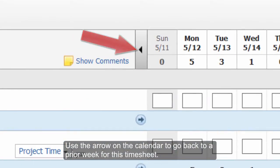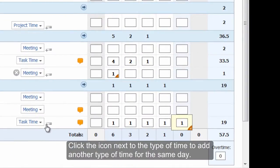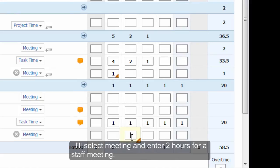Use the arrow on the calendar to go back to a prior week for this timesheet. For admin work, I'm going to enter task hours in the date boxes for time spent emailing and doing paperwork. Click the icon next to the type of time to add another type of time for the same day. I'll select Meeting and enter two hours for a staff meeting.